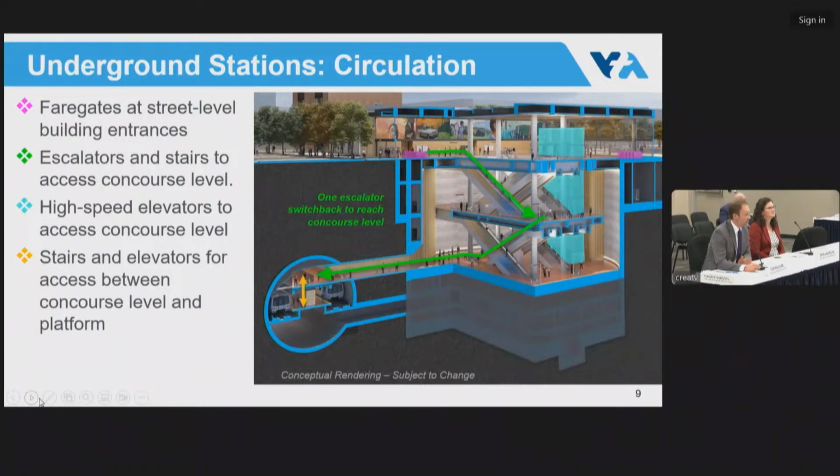The reason the station is designed this way is because it's designed to be built in a way that minimizes the impacts of construction on downtown San Jose. So that tunnel is underneath the center of Santa Clara Street, but the station is off street on property that VTA has been purchasing and assembling for years. And that means that most of the vertical digging and disruption will take place off the street, not in Santa Clara Street, and it'll help us, I don't want to say completely avoid, but minimize the number of times we have to close significant traffic flow on Santa Clara.